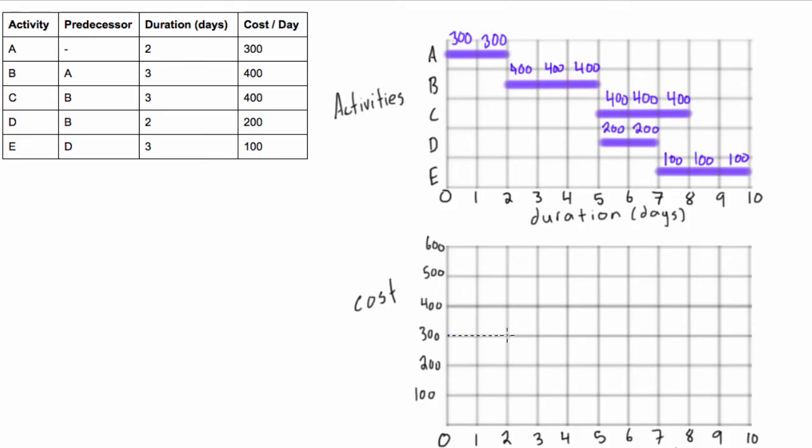So day one and day two, $300. Now let's look at the next day. So day three is $400. Well, day four and day five are also $400, so we're just going to bump up to $400, and then for one, two, three days that will be the cost per day.